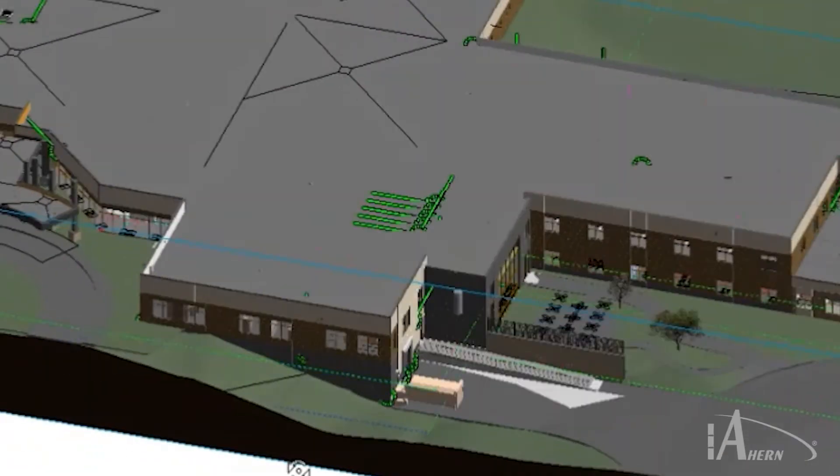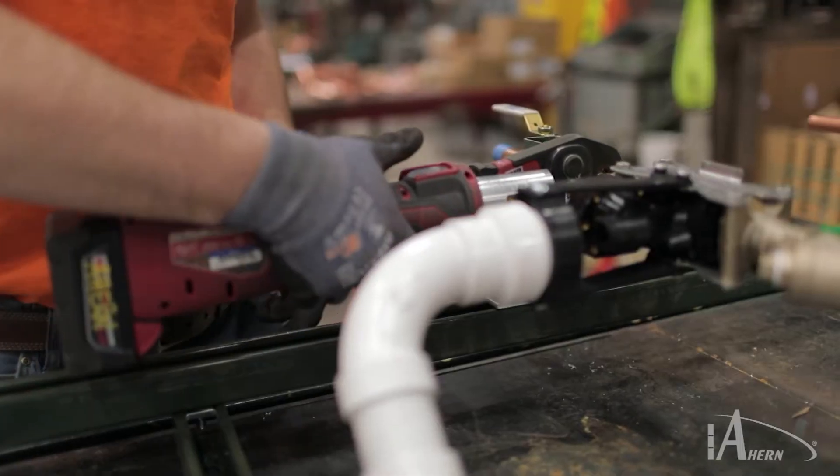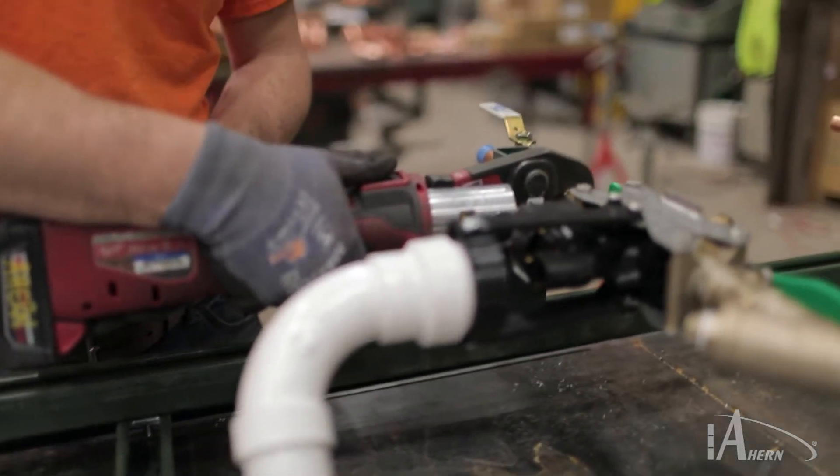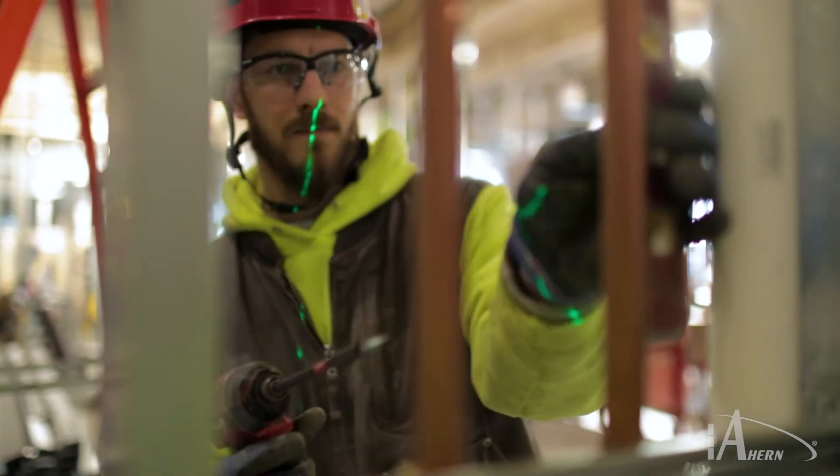However, completing the process of Virtual Design Construction allows coordination and fabrication to happen early on the project and off-site, resulting in shorter construction schedules.